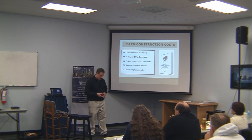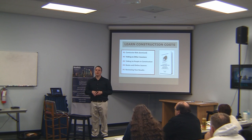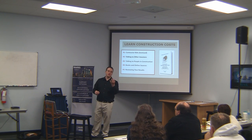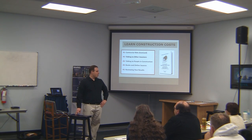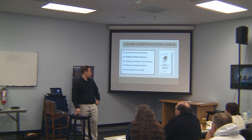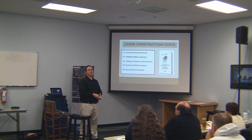We had an absolute disaster — a property down in the Belvedere area of Grandview. We bought it for $25,000 and thought we'd put $25,000 in, so $50,000 total. But everything was wrong with that house — the electrical in the basement didn't work, the cabinets just turned to dust when you touched them. We also had contractor problems. Ended up doubling the rehab budget. If I'd spent more time on those cabinets and tested the electrical more carefully, I probably would have realized they were bad. Review your results carefully — I didn't want to look at it, I knew it was terrible, but you need to look at it very carefully and learn from your mistakes.